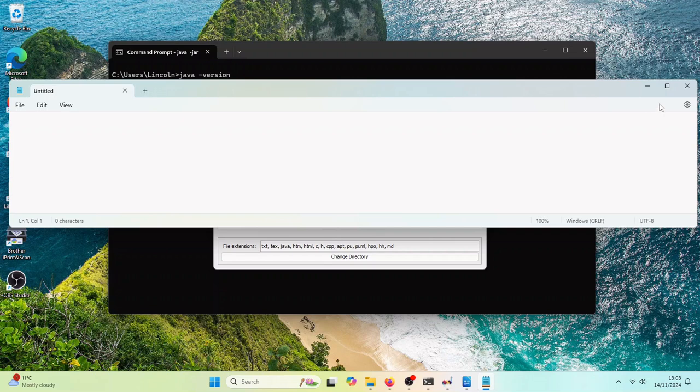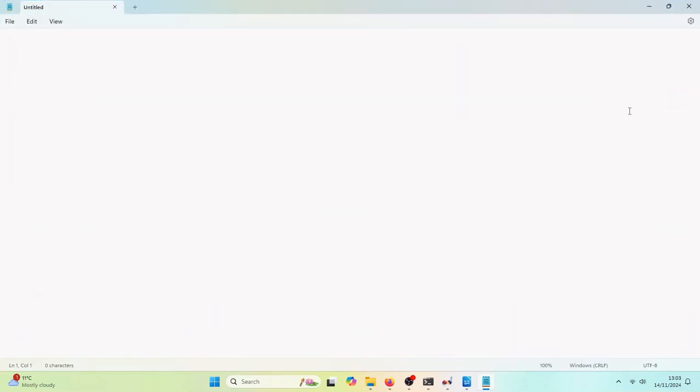When putting together the code, you can use a wide variety of IDEs, but a simple text editor will also do the job. UML code uses the start and stop keywords to denote the beginning and end of a diagram. As I'm creating a Gantt chart, the diagram starts with start Gantt and ends with end Gantt. I'll start my diagram by setting the project start date.